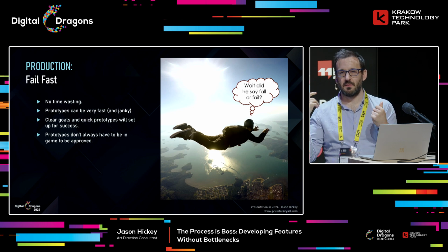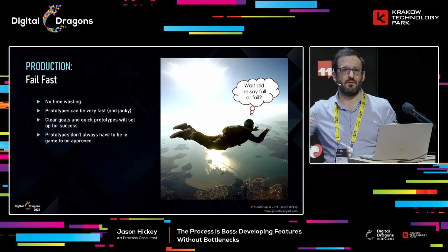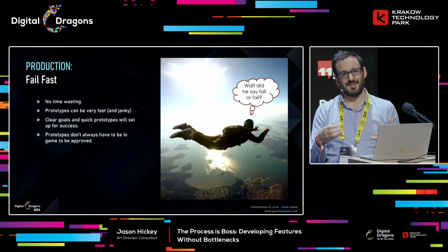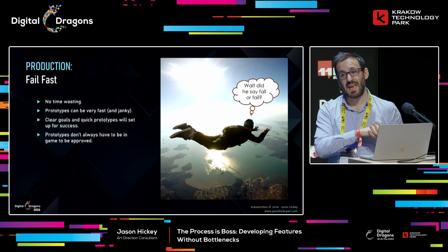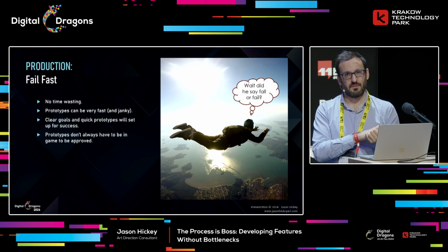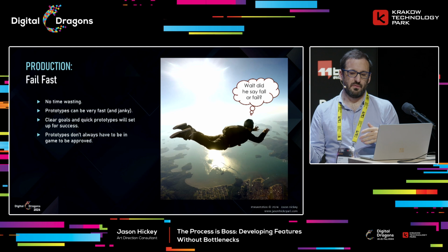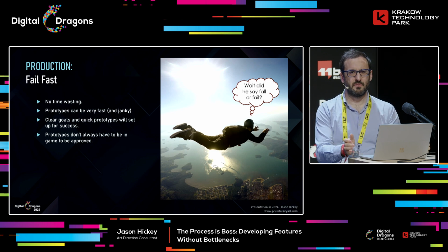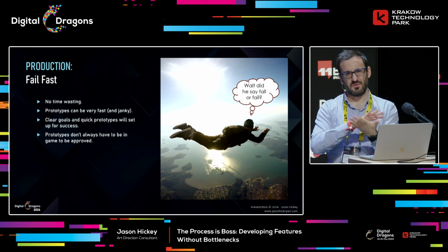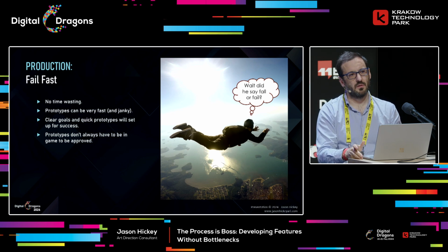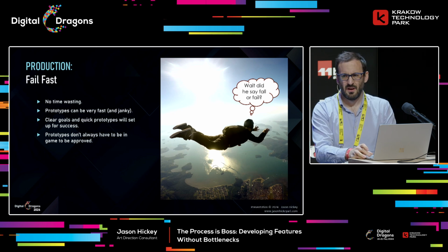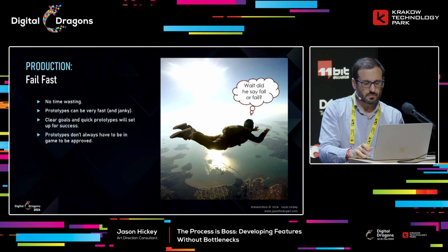In that game, the Tinkerer has this stuff that forms, changes into different weapons. It's programmable matter. And for us to actually get a prototype working in game would have taken ages, and it would have taken a lot of our R&D time. We actually outsourced it to an external studio. I don't think they were even a game studio. I think it was a VFX studio, and they did a render. So it was just a movie, and we're like, yeah, fine, we know that's going to look good. Even though it's super high res and we're not going to get that fidelity, it sells it. And it was a week versus months to get that. So the investment was good.